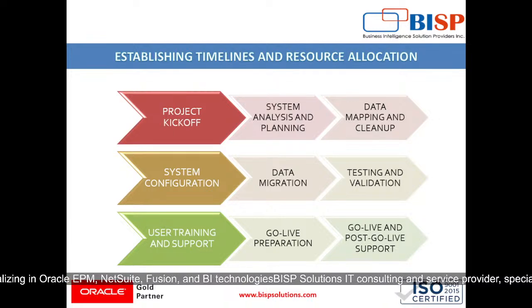Then testing and validation, which means conducting system testing for functionality and data integrity and performing user acceptance testing, which means UAT. And user training and support, which means training our users on NetSuite workflows, reports and dashboards, and providing them user manuals and conducting Q&A sessions if there is any need. Then go-live preparation, which means finalizing the cutoff date for QuickBooks operations and preparing a go-live checklist, which means data validation will be done, system backups are taken, etc.